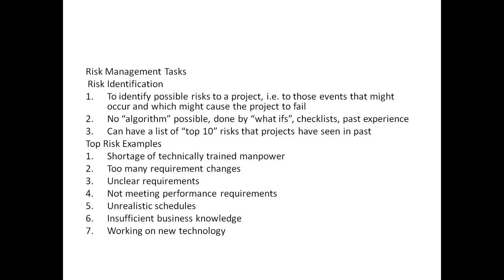What to do in the next stage of risk assessment, that is risk analysis? In risk analysis, the probability of occurrence of a risk has to be estimated, along with the loss that will occur if the risk does materialize. That we should do. This is often done through discussion, using experience and understanding of the situation. But if cost models are used for cost and schedule estimation, then the same models can be used to assess the cost and schedule risk.